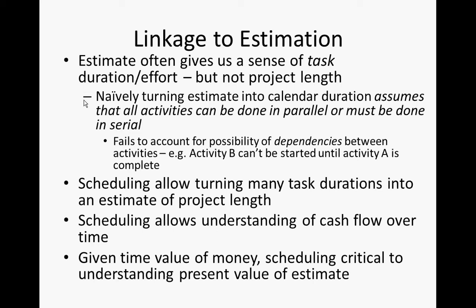So these tasks might have to be done in an order like this, in which case it would take 11 hours of calendar time. On the other hand, it could be that they're all more or less independent. They could be done in parallel with enough resources. So one person could undertake each of the tasks, and maybe it would complete in 4 hours, because the maximum of all these tasks requires is 4 hours.